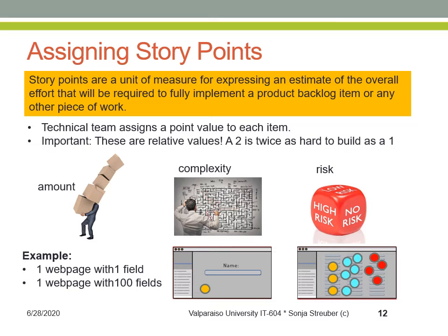Additional risk often also comes from lack of clarity. If a team is asked to estimate a product backlog item and the stakeholder asking for it is unclear about what will be needed, that uncertainty should be reflected in the estimate. Or if implementing a feature involves changing a particular piece of old brittle code that has no automated tests in place, all of these risks should also be reflected in the estimate.